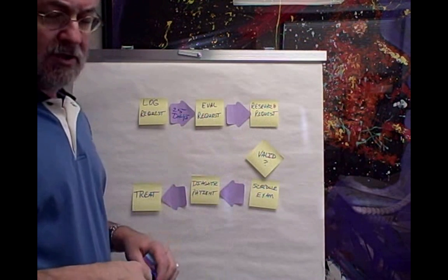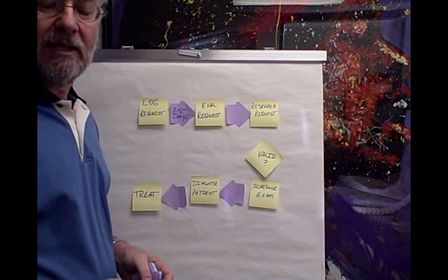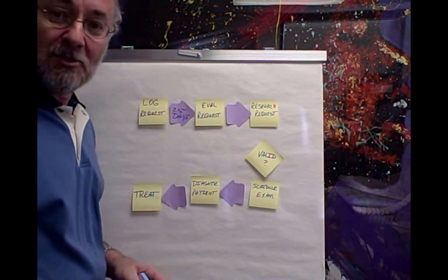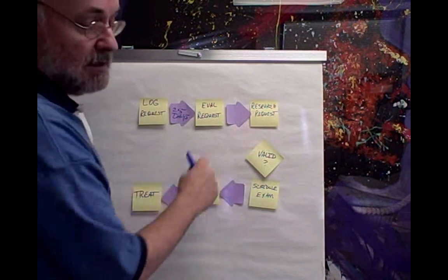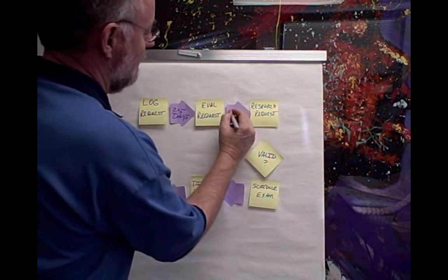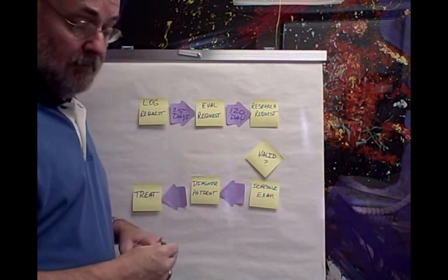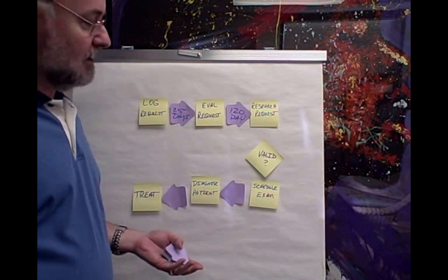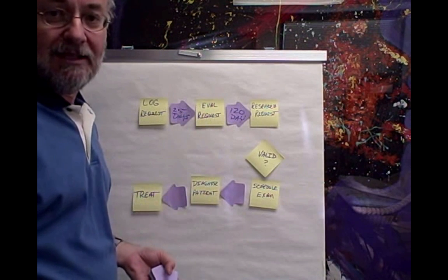Well, we research the request. Really? I said, how long does that take? And they said, 120 days. I said, really? 120 days? One guy, one sheet of paper? And they said, well, no, that might take an hour. I said, so there's a 120-day delay. And very quickly you discover out of this 140-day process, a lot of it is stuck in these two boxes right here.